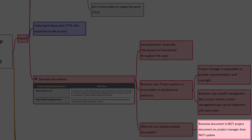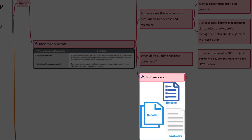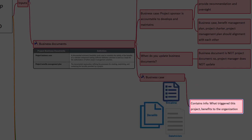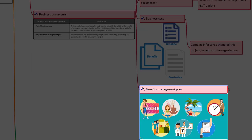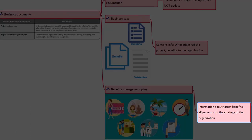When do you update business documents? Business documents are not project documents, so the project manager does not update or modify them. Although business documents are developed prior to the project, they are reviewed periodically to ensure the project will deliver the intended result. Now let's talk about the business case. It contains information such as what triggered the project, what is the benefit to the organization, high-level scope, stakeholders affected, economic feasibility study, and project success criteria. The benefits management plan contains information about target benefits, alignment with the strategy of the organization, time frame to realize the benefits, benefits owners, the metrics that indicate benefits, assumptions, and risks.